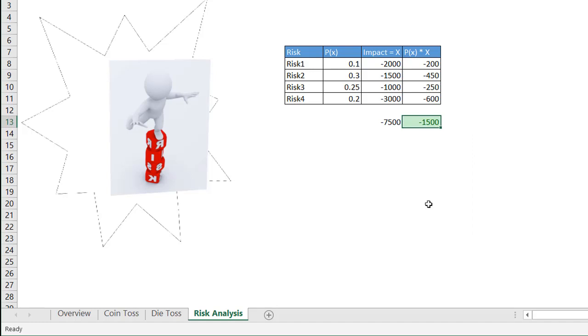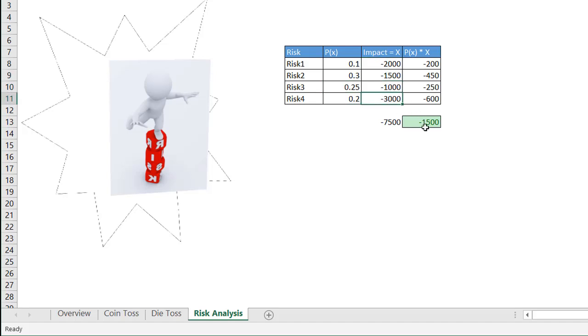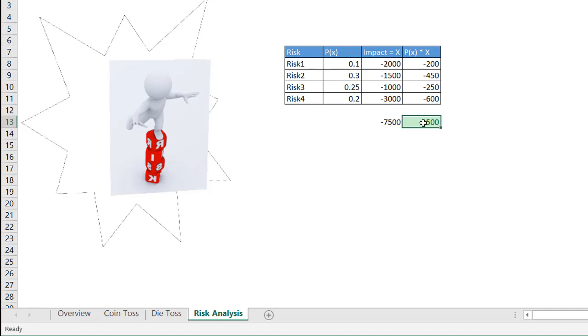So in reality, because we have our probabilities here, and this kind of becomes a weighted average when you think about it, our expected monetary value is 1,500. So instead of thinking maybe we need to set aside 7,500 in our project to mitigate these risks, we may only need about 1,500 based on the probabilities of those risks happening. So that's another example of how we can use the expected monetary value to kind of figure out some calculations for us if we're doing a project.